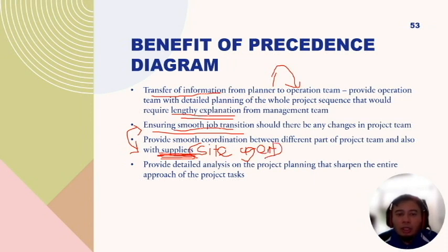The person in charge of ensuring there's no discontinuity in the supply of materials would have better knowledge on when to deliver the material for construction, and this is beneficial especially for sites having very small spaces to store construction material.